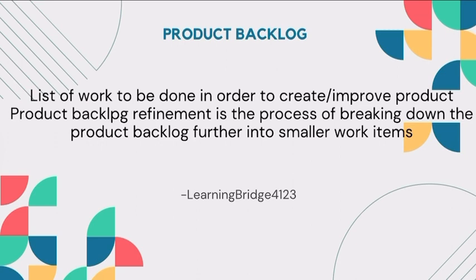It's a process where we further break down the product backlog, because as we move ahead in a sprint, or over a period of time, we get, it's usual, right? We get a better understanding of what work is coming in, and based on that we further break down the items into smaller work items.